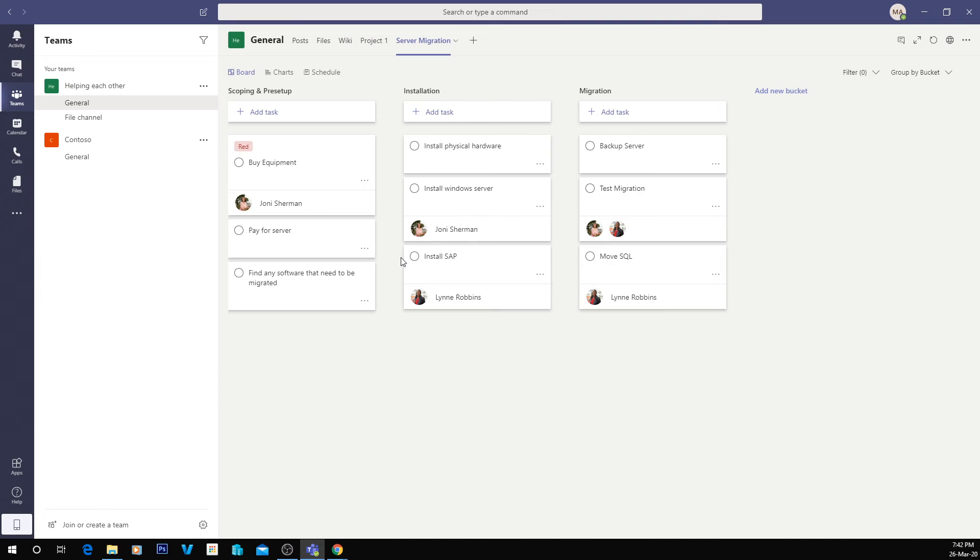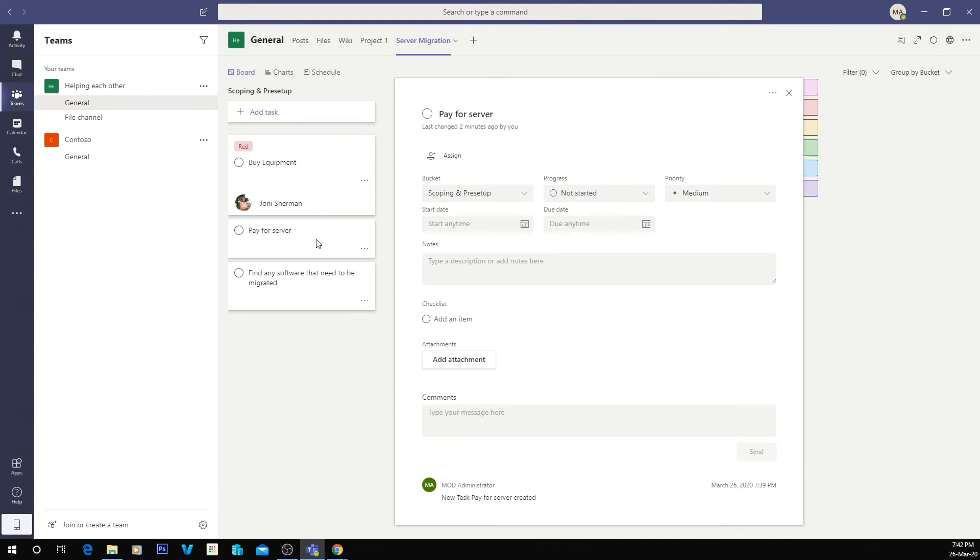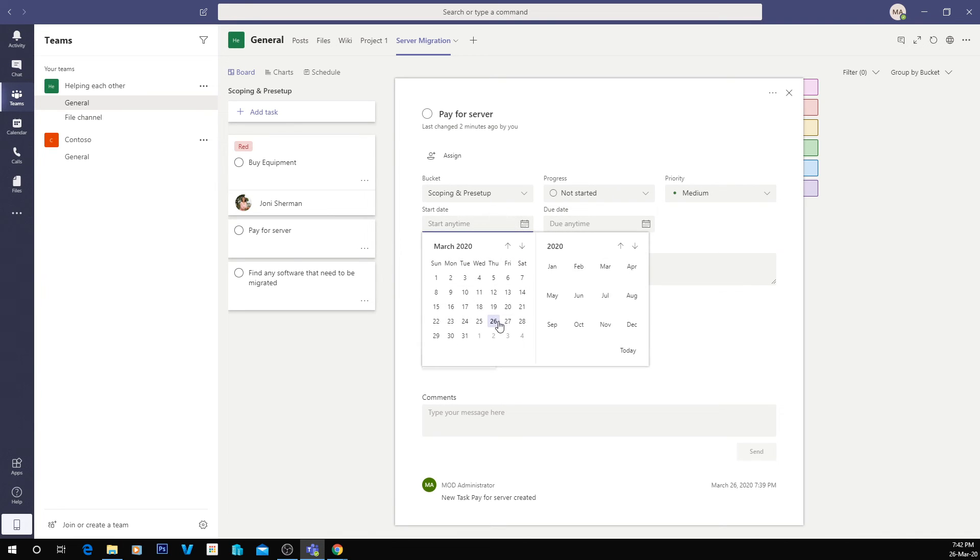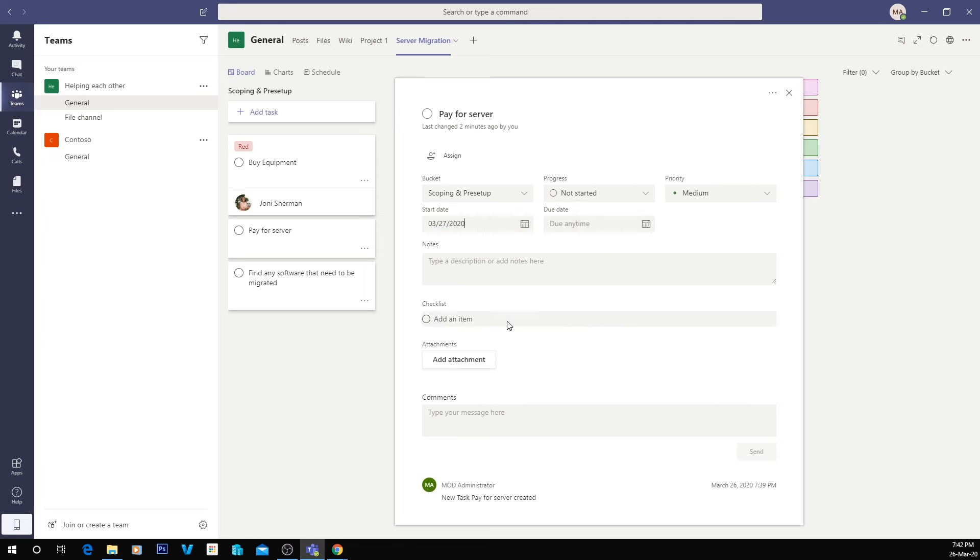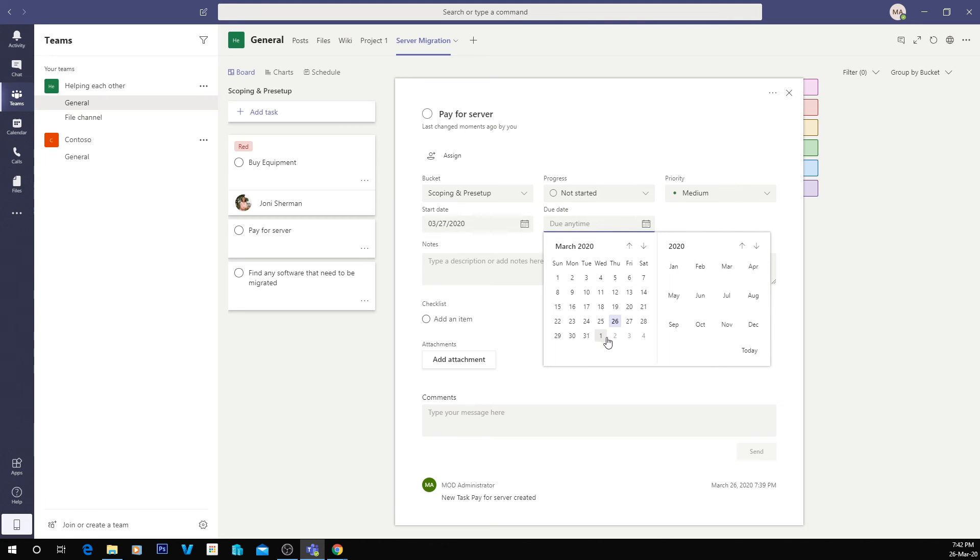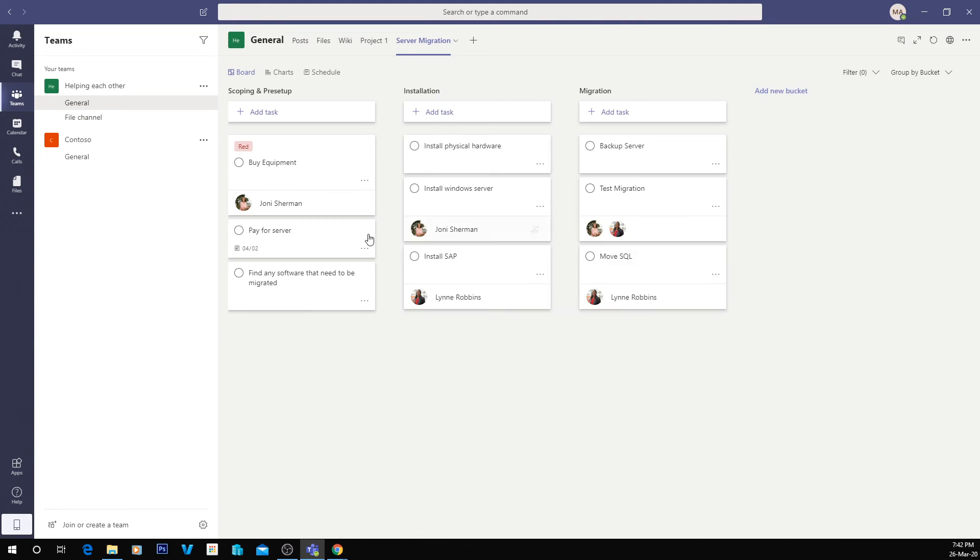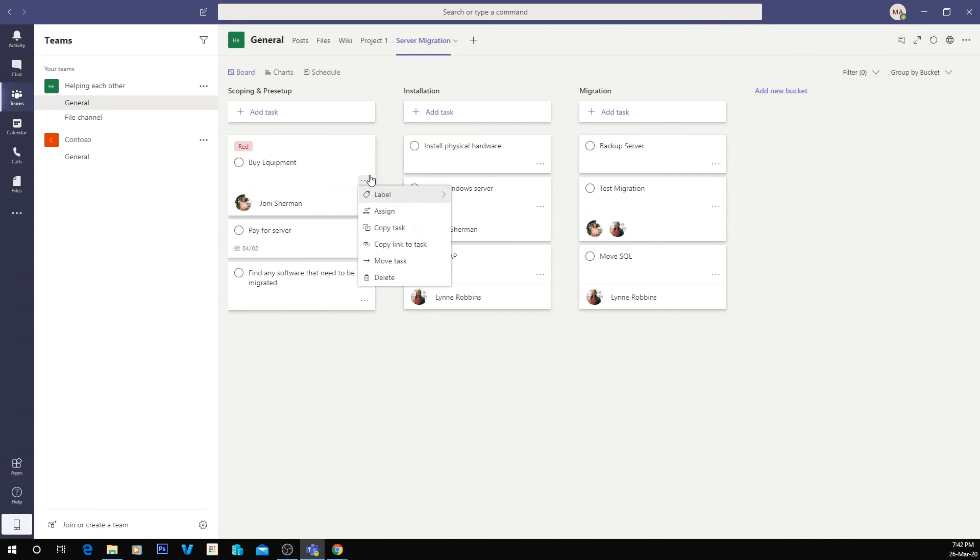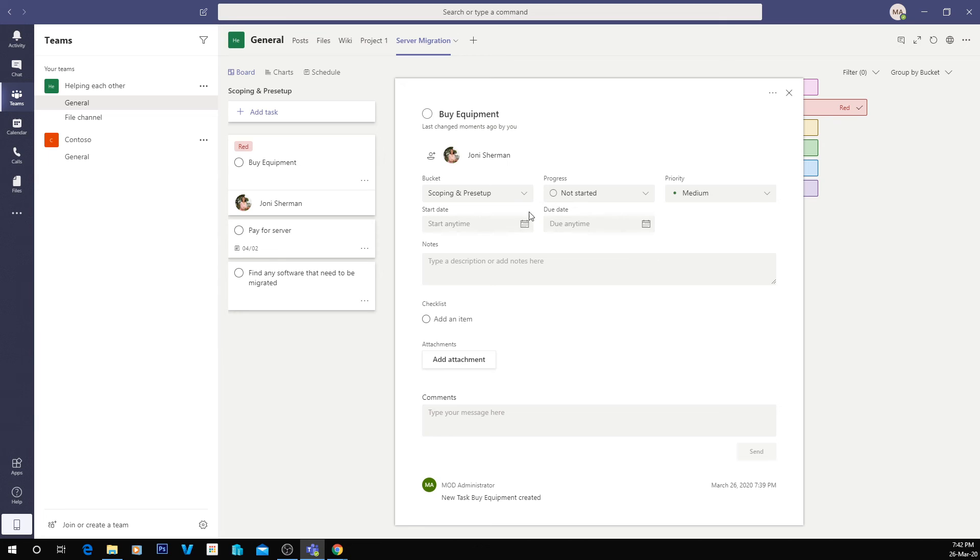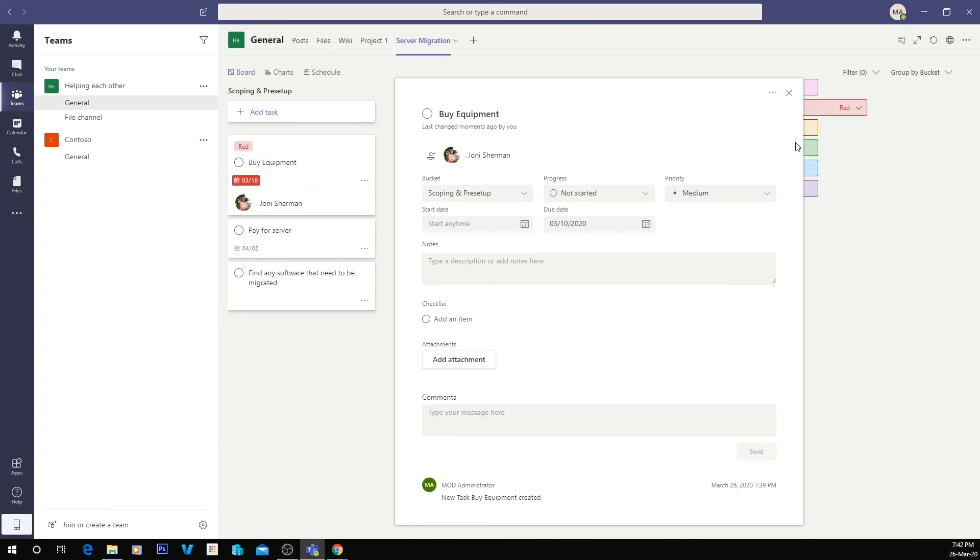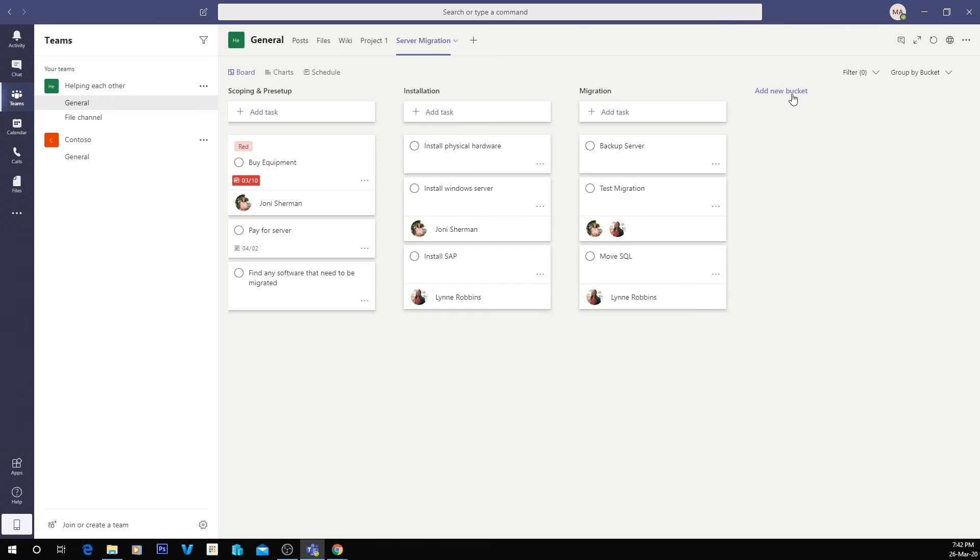Another thing you can do to help you manage all of this is set timeframes. So if we actually click on it, we'll get a full description here. So we can see when we want to start it, so let's give it a start date and a finish date. Then you can see here, it gives you the little date that's due. And we also may want to do that here on this, we'll set one that's behind. So you can see when we're actually behind, when we're overdue it turns red.